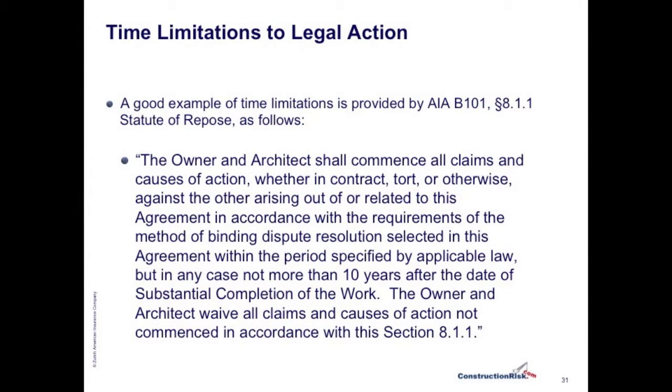Quote, "The owner and architect shall commence all claims and causes of action, whether in contract, tort, or otherwise, against the other, arising out of or related to this agreement in accordance with the requirements of the method of binding dispute resolution selected in this agreement, within the period specified by applicable law, but in any case not more than 10 years after the date of substantial completion of the work. The owner and the architect waive all claims and causes of action not commenced in accordance with this section."